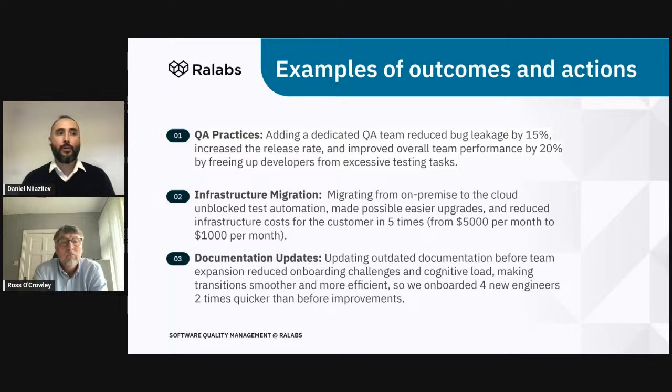Yeah, so they want to expand significantly, and then they want to grow development team from 4 developers to 10 developers. So 4 more developers we should expect next month. And with knowledge that we have not enough documentation, we, from previous experience, know that onboarding, any rotation inside of the team, the knowledge sharing is much more expensive in terms of the time.